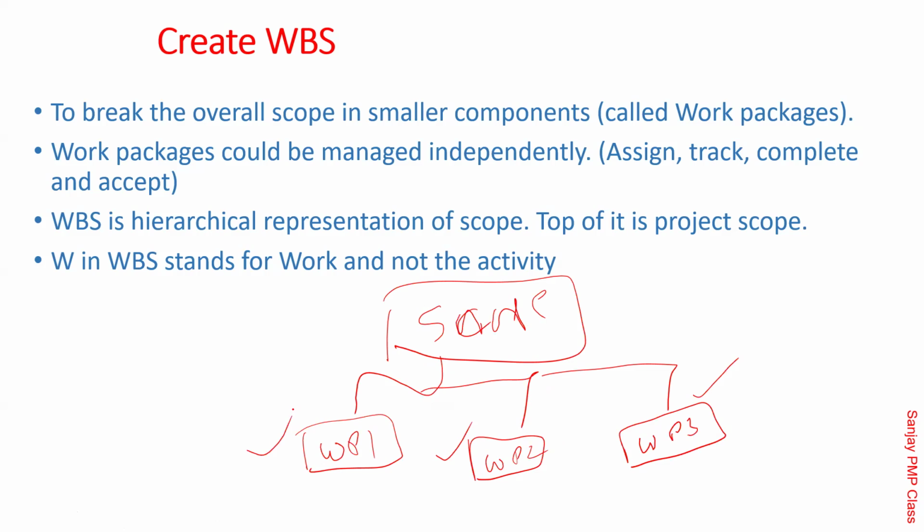That is called create WBS. Work packages could be managed independently, which means they could be assigned to an individual, tracked, and completed and accepted separately. Once all the work packages are completed, the whole scope is delivered. That's how you should go about it.